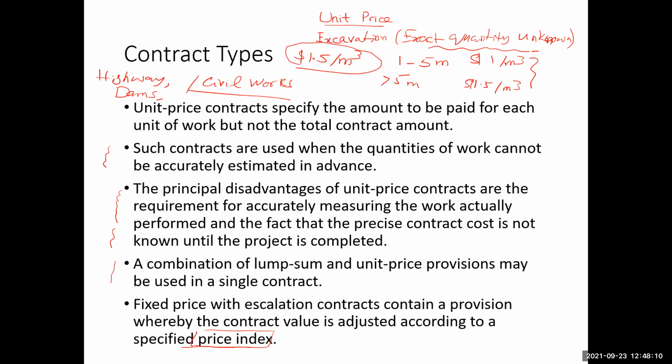So for example, in a long-term project, the supply of certain types of windows in the building project is needed, but in the future, due to changes in the price, and the windows also being imported from overseas, the prices of those windows may be increasing. So therefore the price of that contract may be adjusted. This is called escalation.